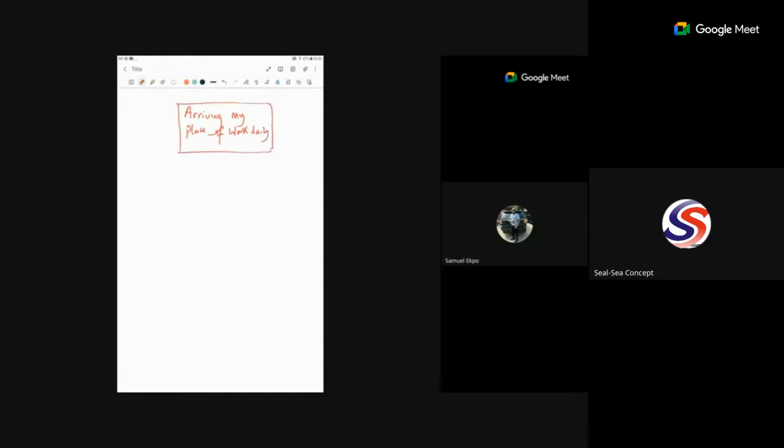Don't forget the process we are on now is WBS. That's work breakdown structure. Just as it stands, work breakdown structure gives you a diagrammatic view of every little task that is involved in your project. Without your work breakdown structure, you won't be able to get your budget correctly. You will see that. Without your work breakdown structure, you can never have an accuracy on the time frame that your project will take.